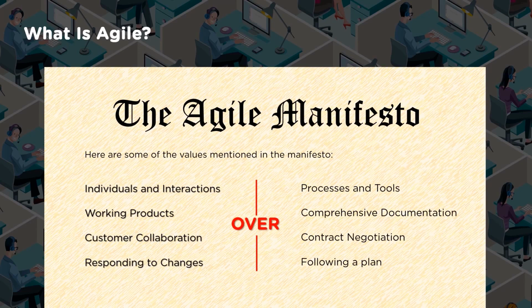So now this requires a lot of flexibility in the contract itself, so the commercial is one area which gets impacted, and there should be guidelines for that also in the contract. So that during the collaboration, during the change, during the effort being put in, the customer is also informed what change is going to happen in terms of commercial as well as time and everything, so that it is documented in the contract. So there is no confusion.